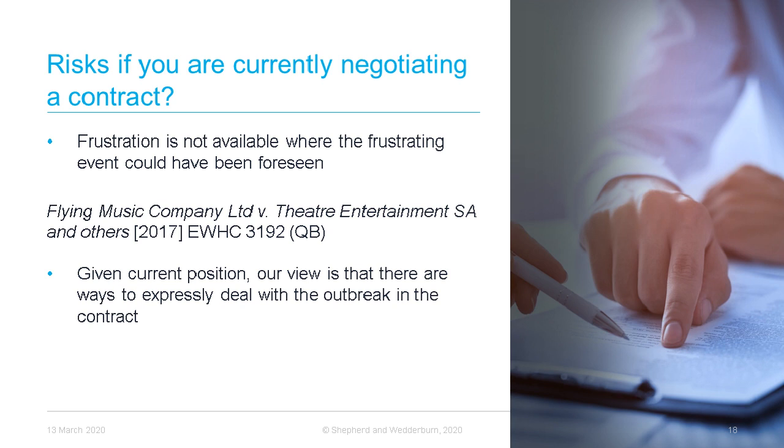The promoter argued that the civil unrest in Greece, which was a result of the austerity measures that had been imposed by the Greek government, was already in existence when the contract was made, and it had not really become worse during June 2010. In its judgment, the High Court agreed with this and held that it did not amount to frustration.